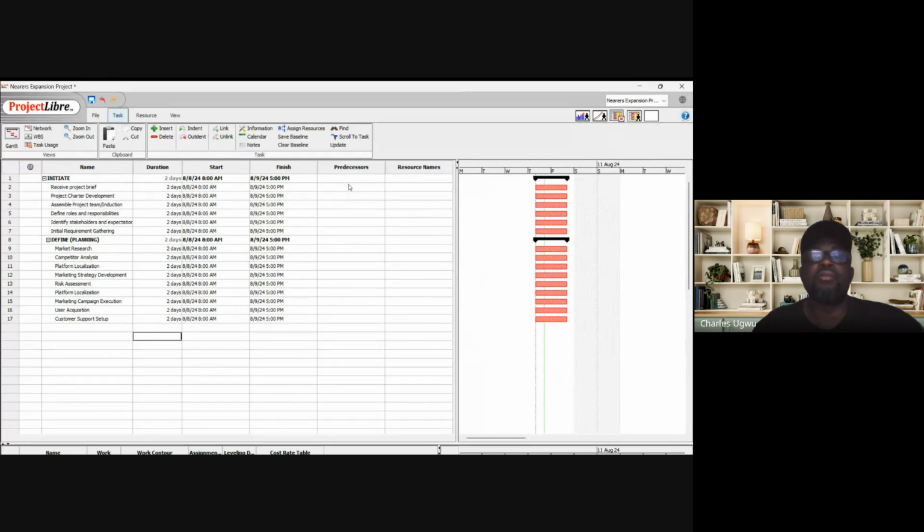Under this, it is starting on this day. And what we need to do here is that this project brief needs to finish before we start this project charter.